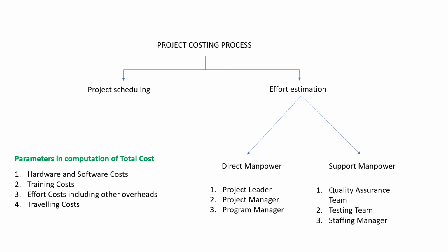Effort estimation is the major activity while calculating the cost of a project. This cost is very crucial, because based upon this cost, any IT ITeS company will quote the price of a particular project to their prospective clients. So it is the major activity in the IT ITeS industry. Coming to the various parameters in computation of total cost.